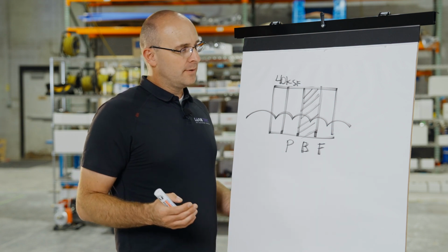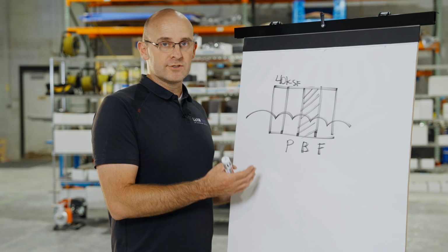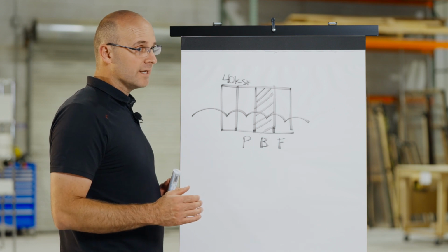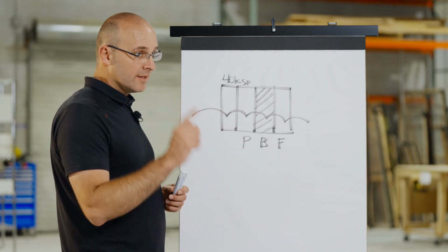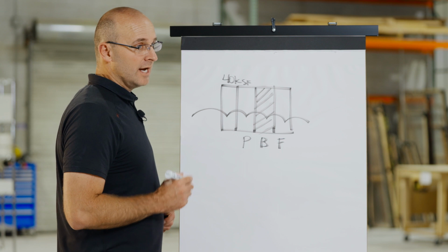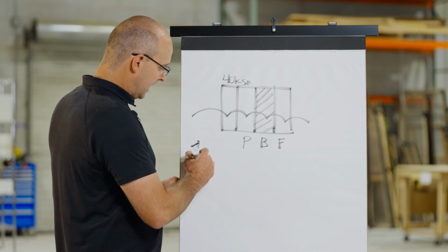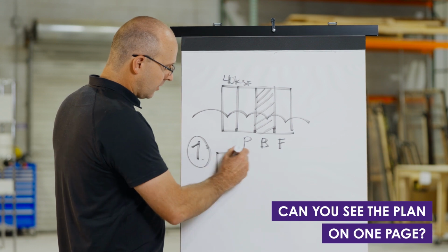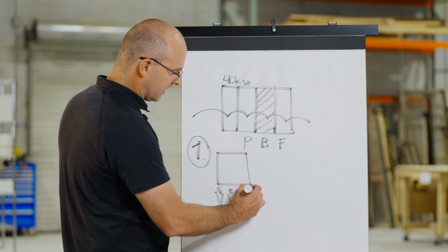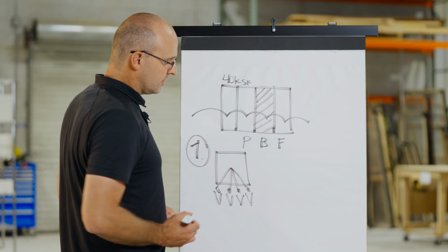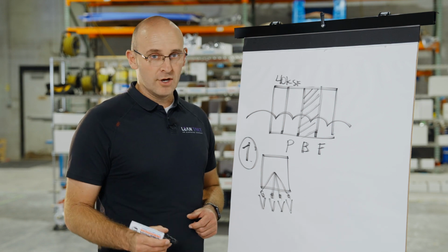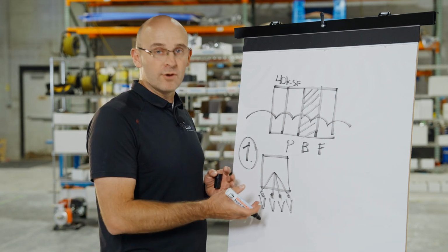And so what I want you to be able to do is analyze, are you able to work in one process flow, yes or no? So if you have a project that's scheduled with takt planning and you have it by zone, the things that you will want to know to make sure that you are flowing are these concepts I'm about to explain to you. Number one, can you see the plan on one page? Meaning that if you took your crew and everybody on the project site for that matter, can they see the plan together so that everyone can see as a group, know as a group, and act as a group, yes or no? If the answer is no, it's very difficult to flow because people don't even know where they should flow.